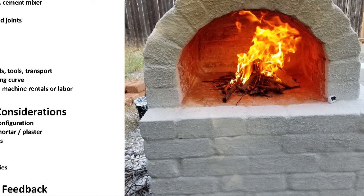And then lessons learned, and I already spoke about some of these, but material making is the biggest barrier to urban construction as far as construction progress, or progress of the construction sequence. Pretty much anything else we build with, we get to just buy it already made, and then we build with it. In this case, it's not so easy to do, so that's the biggest holdup, or the link in the chain that needs to be fixed. That was just the experience with the small thing, but that's definitely scalable.